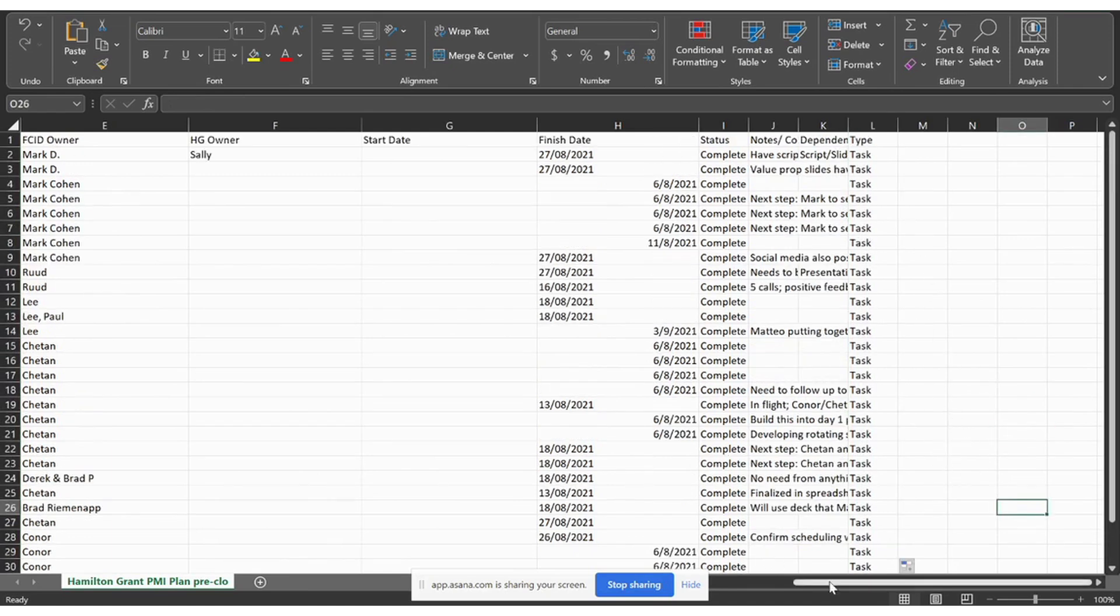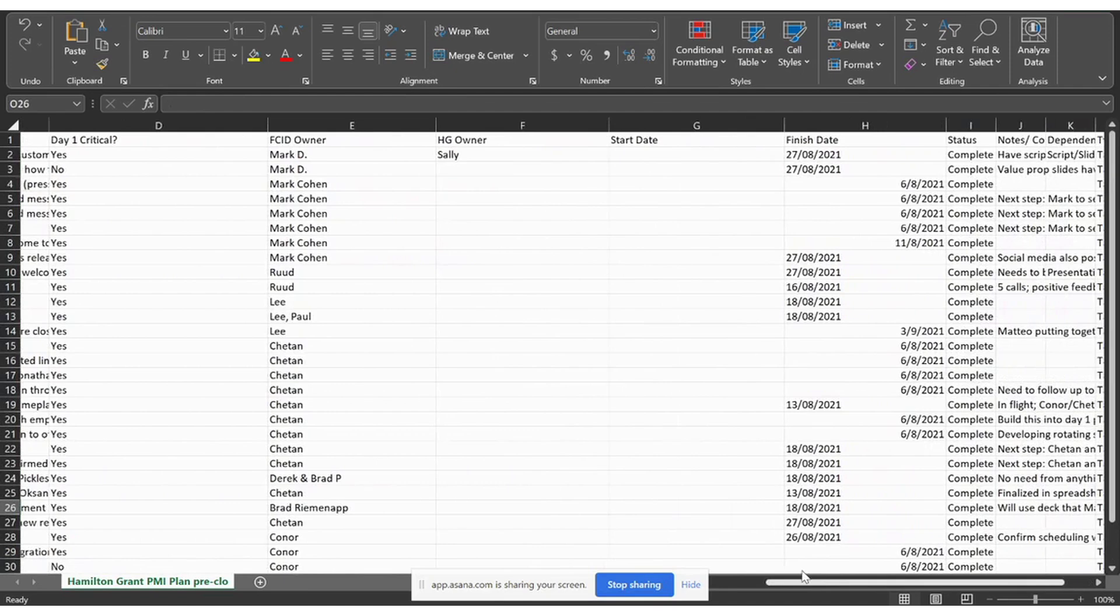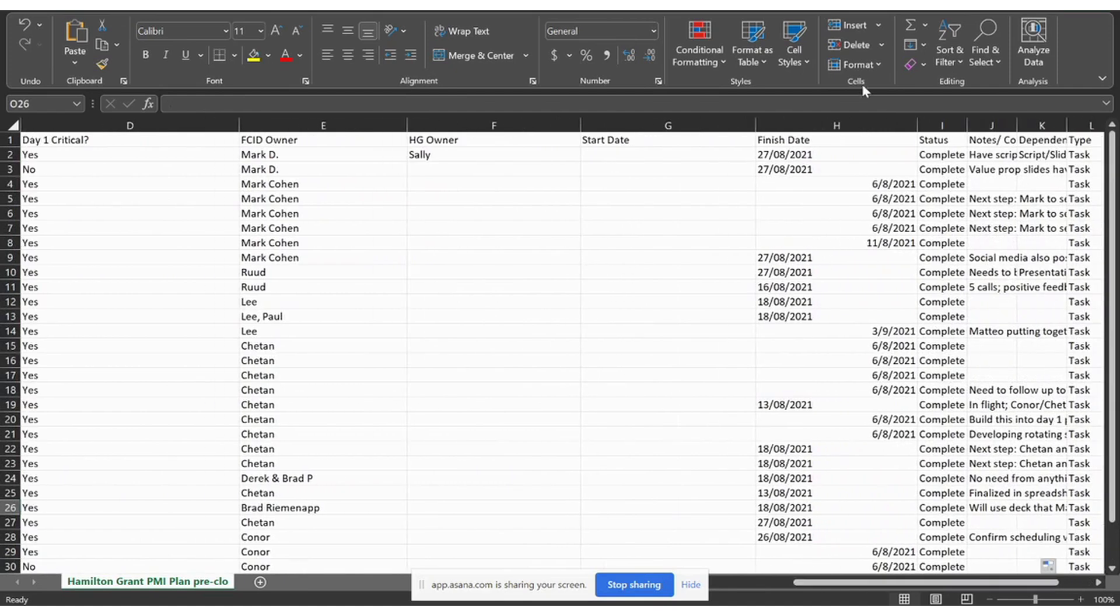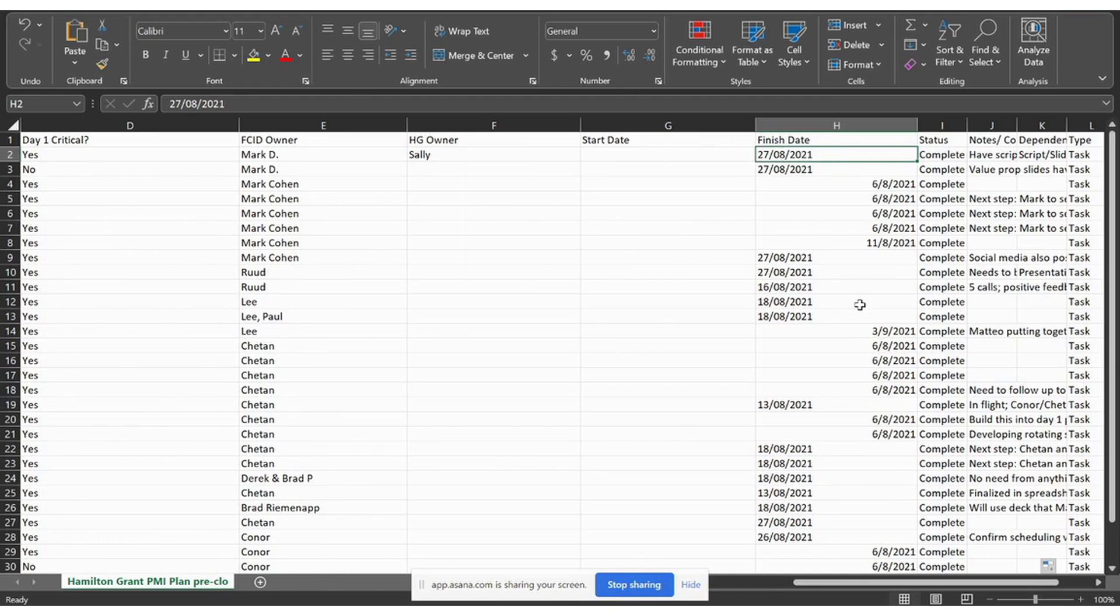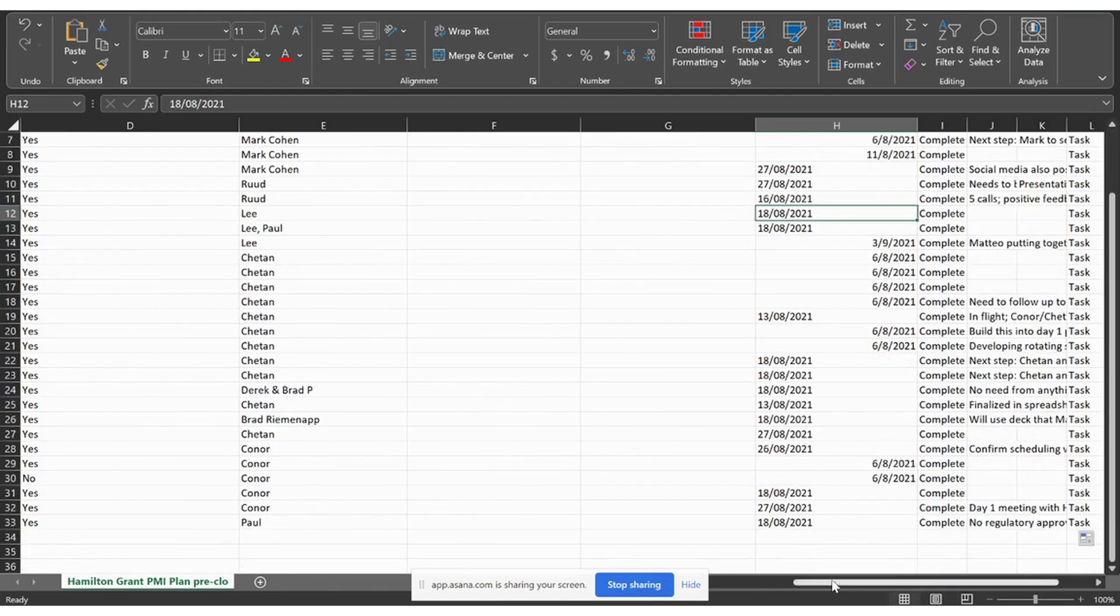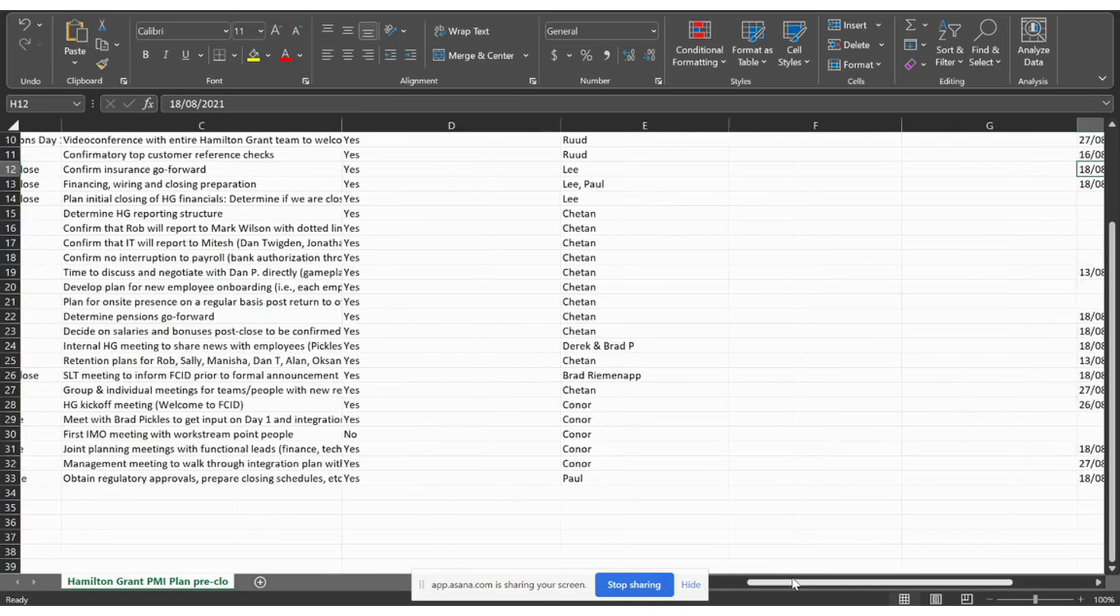The other important thing to know for it to map over properly, if you have any dates, the dates need to be in the format of double digit day, double digit month and double digit year. So, again, that's double digit day first, then the month and then the year. If you don't have that, it will not map over properly.